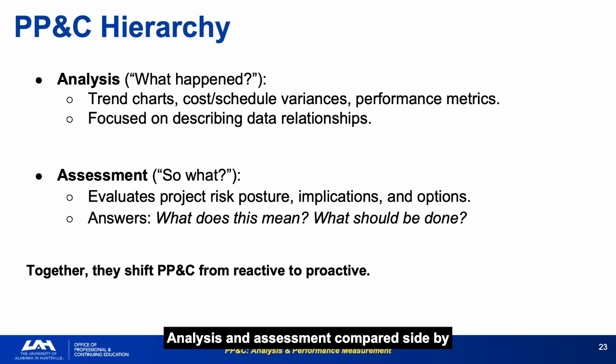Analysis and assessment compared side by side. Analysis uses trend charts and variance metrics to describe what happened. Assessment evaluates implications and recommends actions. Analysis without assessment is like reading a blood test without discussing what the results mean for the patient. Together, analysis and assessment shift PP&C from reactive to proactive. The program manager gets insight before the problem becomes a crisis, not after. If your monthly report describes the data but never answers, so what or now what? You're providing analysis without assessment.